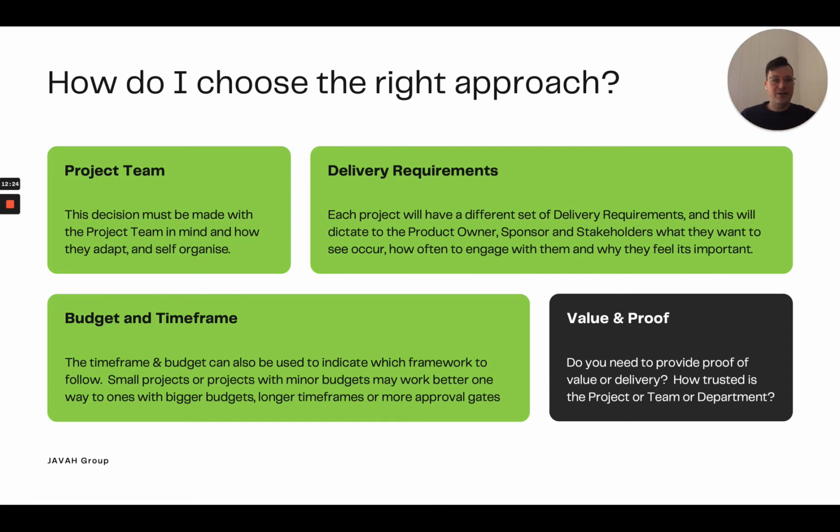Scrum is often a little bit easier to do that because you can define, oh, I have a 2-week block and I know that 2-week block costs me X, and I know that it is 2 weeks. There's no variation there. You know what's going in, you know what's coming out, and you've got a really good idea of that. It's also a lot easier with approval gates. So once we've completed X, you will approve it, and then we'll be able to move on to Y.